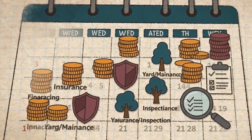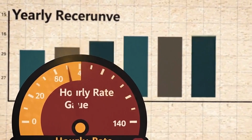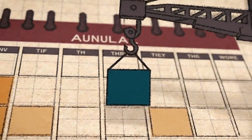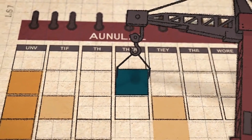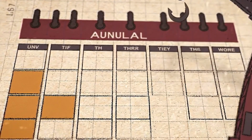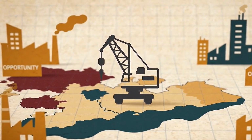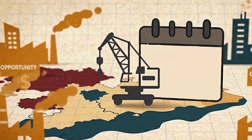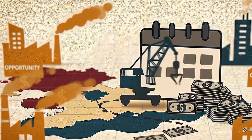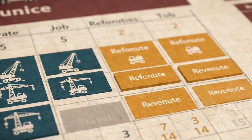The rules matter because they show why moving an extreme asset is not just a trucking problem. It is a coordination problem. The route has to exist legally as well as physically. A large load may interact with time restrictions, escorts, approved routes, and project access. A delay on the road can become a delay in assembly. A delay in assembly can become a missed work window. A missed work window can turn into a customer problem before the crane ever takes a load. This is why crane rental companies can list permits and mobilization separately from equipment time. The service is partly logistics, and logistics is partly regulation. For a small rental asset, transportation may be a minor accessory to the product. For a giant crane, transportation can be one of the reasons the business requires so much organizational infrastructure around the machine.